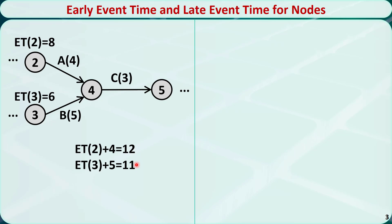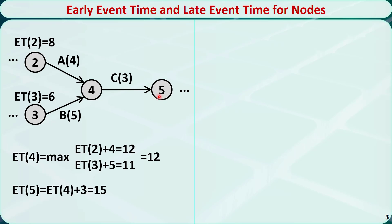So we have two options, and we need to determine which one to choose. We know that node 4 can happen only if both activities A and B are finished. At time 11, although activity B is finished, activity A is still not finished. So we need to pick the larger number. Therefore, the early event time of node 4 should be 12. Now the earliest time node 4 can happen is at time 12, and the duration of activity C is 3, so the earliest time node 5 can happen is 12 plus 3, equal to 15.